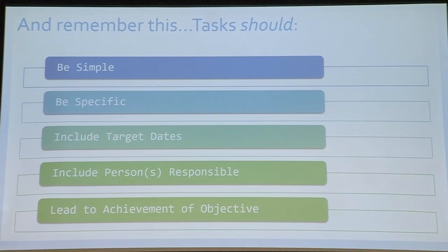These schools were sitting at 0% progress for years. I mean, they were seeing no progress. So I also asked her, after she made a new task every time she saw the word and or a period, there were 17 tasks. And now I said, go in and mark all of them complete that are complete. They went to 87% progress.